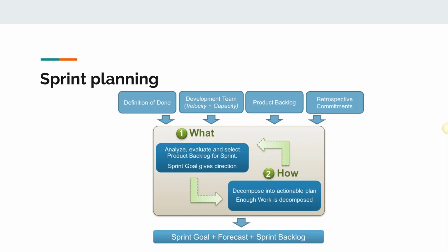So I can always add more work. I can take it from the product backlog and get it into the sprint backlog. So let's say that the development team was super fast. They have finished both Apple Pay and credit card already. Two weeks of sprint is done. They have one week left and they have a lot of time and no work. They can feel free to pull maybe another payment gateway from the product backlog, fit it into the sprint backlog, and they can start working on it.